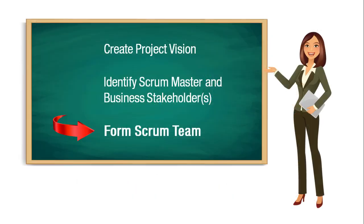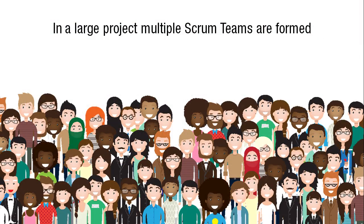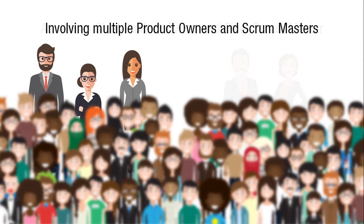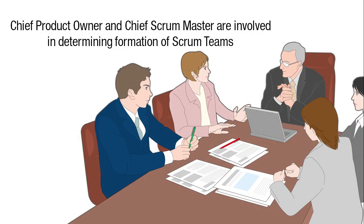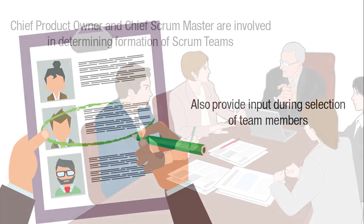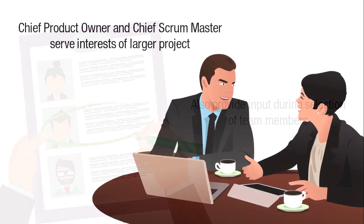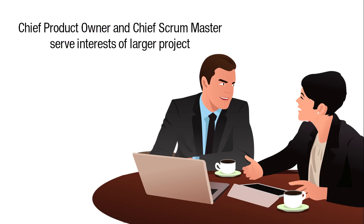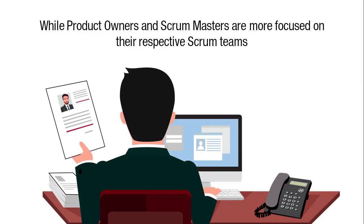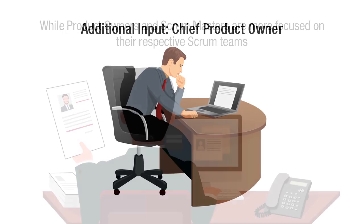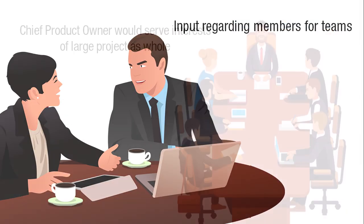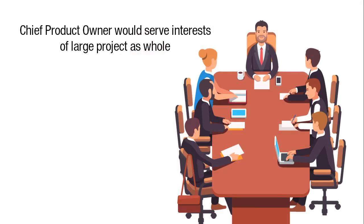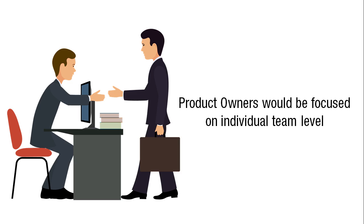The next process in this segment is Form Scrum Team. In a large project, multiple Scrum teams are formed, involving multiple product owners and Scrum masters, as well as a chief product owner and chief Scrum master. The chief product owner and chief Scrum master are involved in determining the formation of the Scrum teams and also provide input during the selection of team members. The chief product owner and chief Scrum master serve the interests of the larger project, while the product owners and Scrum masters are more focused on their respective Scrum teams.